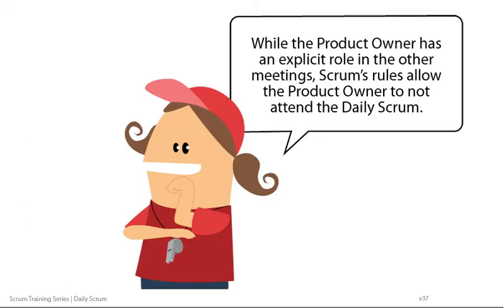While the product owner has an explicit role in the other meetings, Scrum's rules allow the product owner to not attend the daily Scrum.